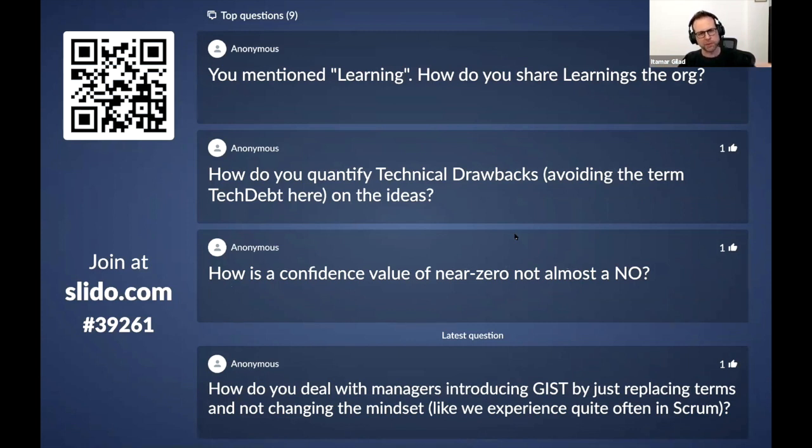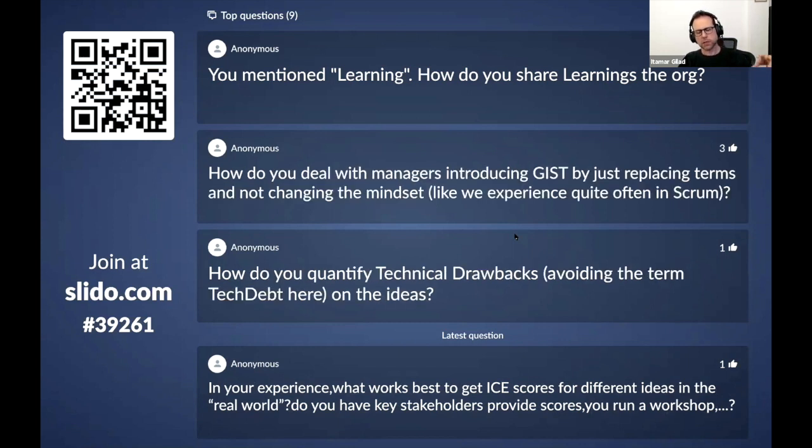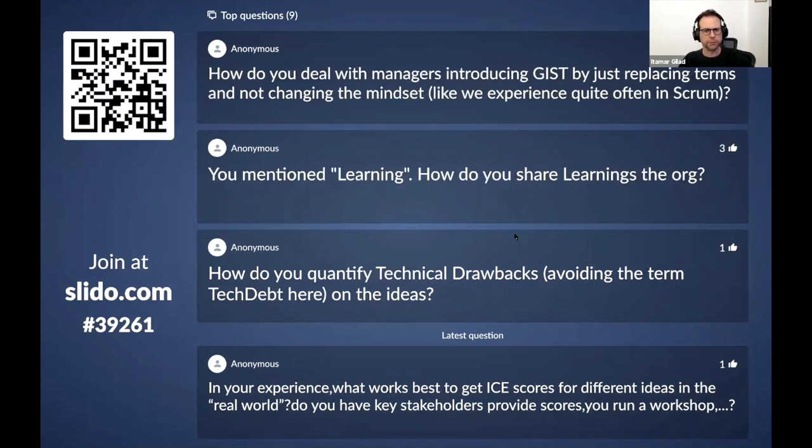the friends of the manager, then it's a 0.01. Is it a yes? Is it a no? We don't know. We should also guesstimate the impact, and we should also think about ease. Then we have a number. Then we see how it stacks up against other things. Most ideas start out with very low confidence because we don't have any other evidence except our own opinions. But that's fine, because as we go forward in the cycle, as we test some ideas, as we pick some ideas to put into steps, evidence will come.